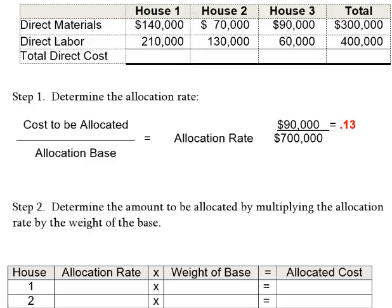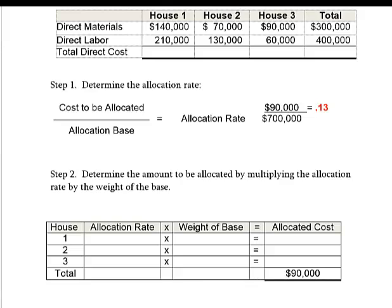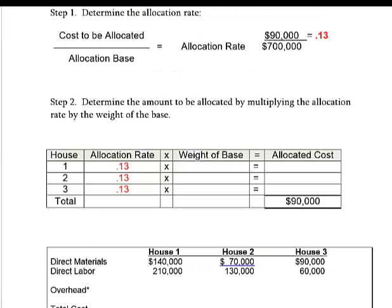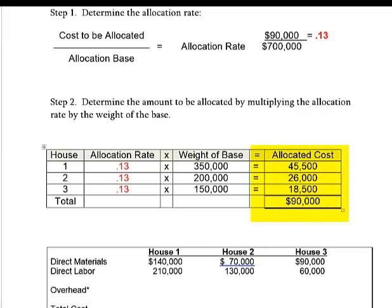Step two: use 0.13 to allocate overhead to the three houses. The allocation rate is the same for each house. For each house, the weight of the base is how much direct materials and direct labor went into it. House one had $350,000 of direct cost; house two, $200,000; house three, $150,000 — reflecting that the small starter home required less materials and labor. Multiplying each by 0.13: house one is allocated $45,500 of overhead, house two $26,000, and house three $18,500.